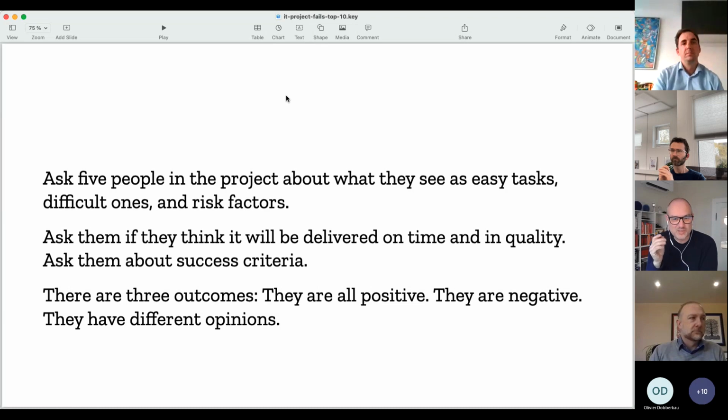And this is really interesting because it doesn't require that you look into the code. It is just having lunch with 5 different people, 15 minutes per person. And this is one of the biggest tricks that you can have in your bag. This is just so cool, and you can learn from them. You can ask, who do you think should be in charge of whatever task there is? And you can ask them, is there anything that we haven't thought about? And what happens when we ship this to customers? You get lots of good ideas, and then you can align that with the project plan.